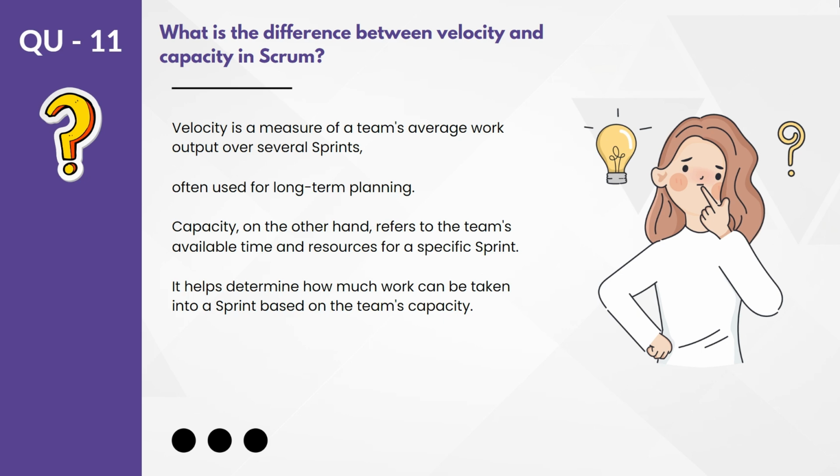But during the sprint there can be one public holiday. So now you moved from 10 working days to 9 working days. So that is changing your capacity. Okay, now from these 5 members, suppose one person is off for 2 days, two persons are off for 1 day each. So like that there are 4 holidays, so again 4 days are gone. So based on the calendar and based on the team's leave plan, your capacity will be changing sprint to sprint.